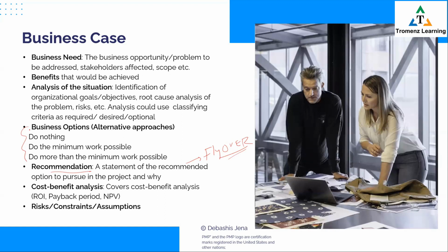Well, the answer to that is, whoever is creating the business case, we want to ensure that we give due consideration to various alternatives that were available. Or in other words, what should not happen is somebody suggested flyover, everybody got carried away. No, not a good idea. Maybe there's a better, more economical way to address the problem at hand. We had better pursued that. So that's the reason we mandate to include what alternatives were available and recommend the best one.